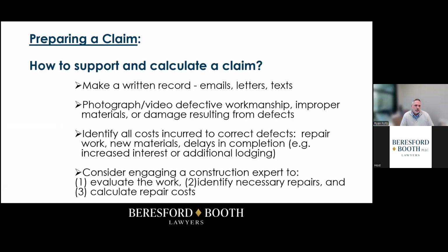You should also identify other costs that are incurred as a result of the defects, not only the repair work or new materials, but costs associated with delays in completing the work, which can include lodging if you're unable to live in the home or if it's a new home, or additional interest, for example, on a bank loan that you may have pulled to cover the costs of construction.